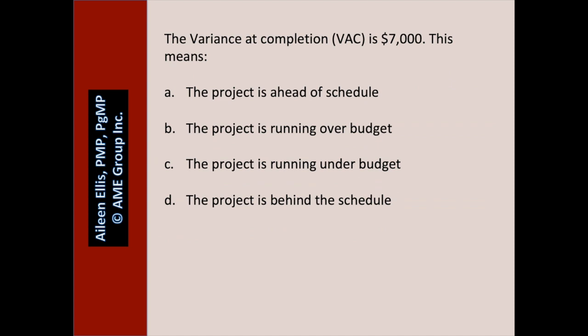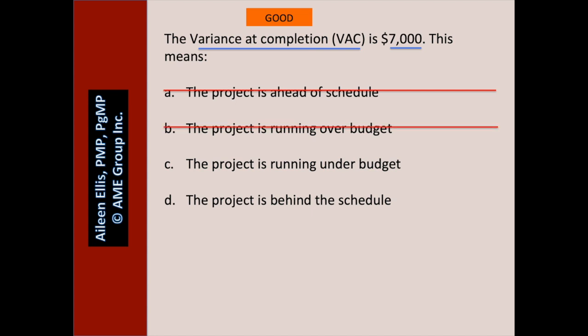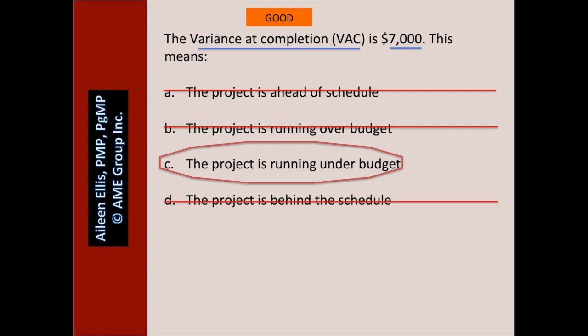The variance at completion is $7,000. This means — pause the video and answer the question. If the variance is a positive number, is this good or bad? It's a good thing — it means we expect to underrun. A: the project is ahead of schedule — we have no idea. B: the project is running over budget — no, that's false. C: the project is running under budget — yes, and that's why we expect to have a positive variance. D: the project is behind schedule — we have no idea.